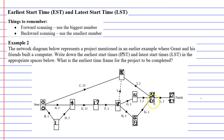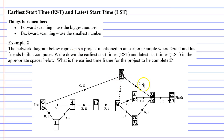Looking at the next vertex, 24 minus 2 gives us 22. Activity J cannot start any later than 22 minutes into the project, otherwise the next activity will start late and delay the project. You can see there's a one-minute window — it can start as early as 21 minutes or as late as 22 minutes. Activity I takes two minutes — 24 minus 2 gives us 22. Activity I has quite a decent four-minute window; it can start as early as 18 minutes or as late as 22 minutes.